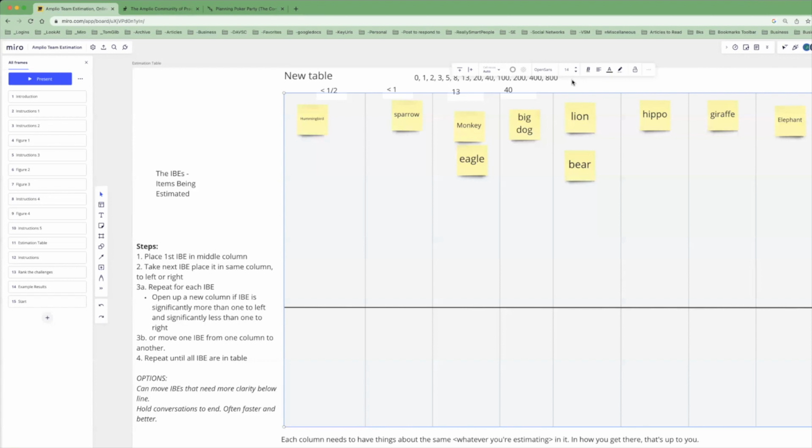One, if I need to break it up to get clarity on what it is, and that's just the approach on minimum business increments. There are 2 different ways of doing it. You take it from the small pieces up or take it from the big piece down. They both work. So if I'm doing something like I need clarity, I might break it up. If I'm about to go and work on it, I might break it up. But that would be the determining factor. Does that make sense?